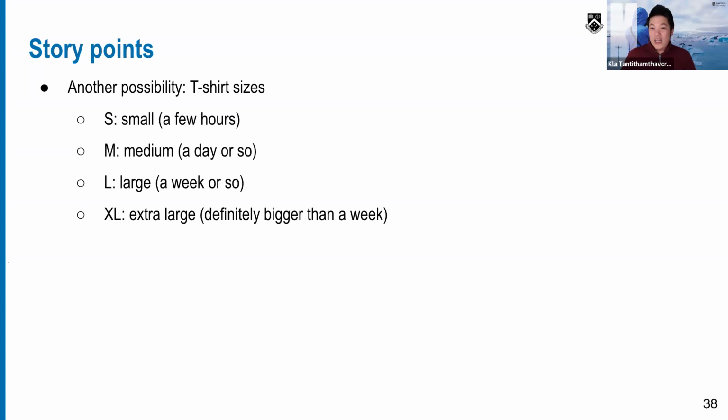Then it goes back to the question of whether that user story is small enough or not. Let's say you have a 1 week sprint. When we assign a user story an XL, it means that user story cannot be delivered within that 1 week sprint. You need more than a week already. So by the end of the sprint, you really have no idea what the deliverables would be for that extra large user story. Does it make sense?